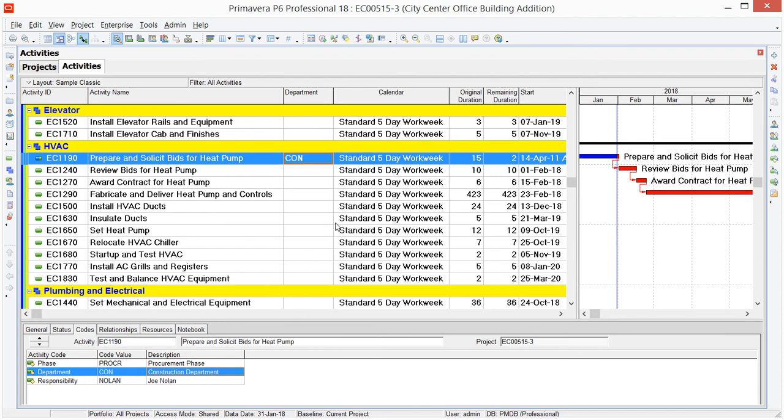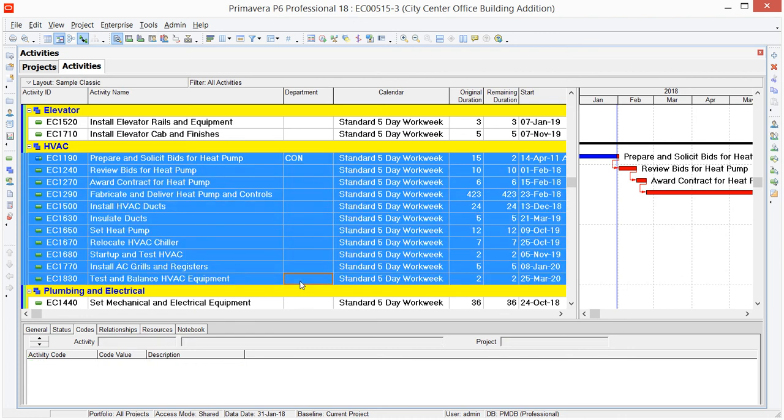With Fill Down, let's say I want this Construction value to be copied into the rest of the activities in this section of work. I can select my Shift key and highlight all the activities in this HVAC grouping band. I could actually cross grouping bands if I wanted to.